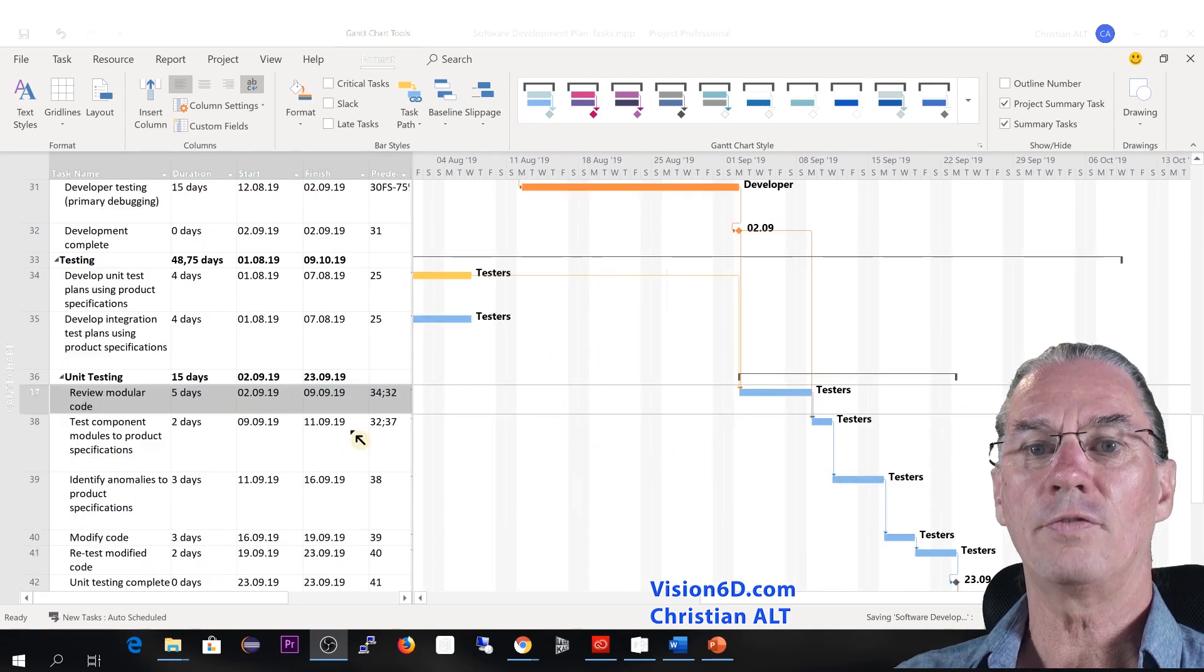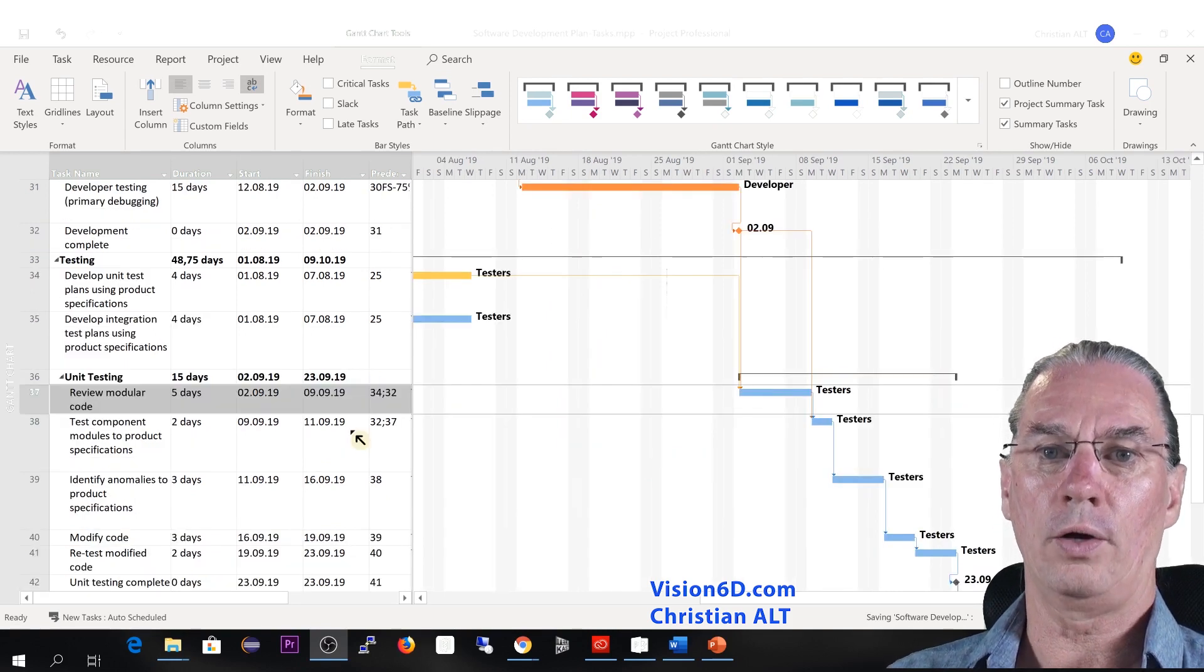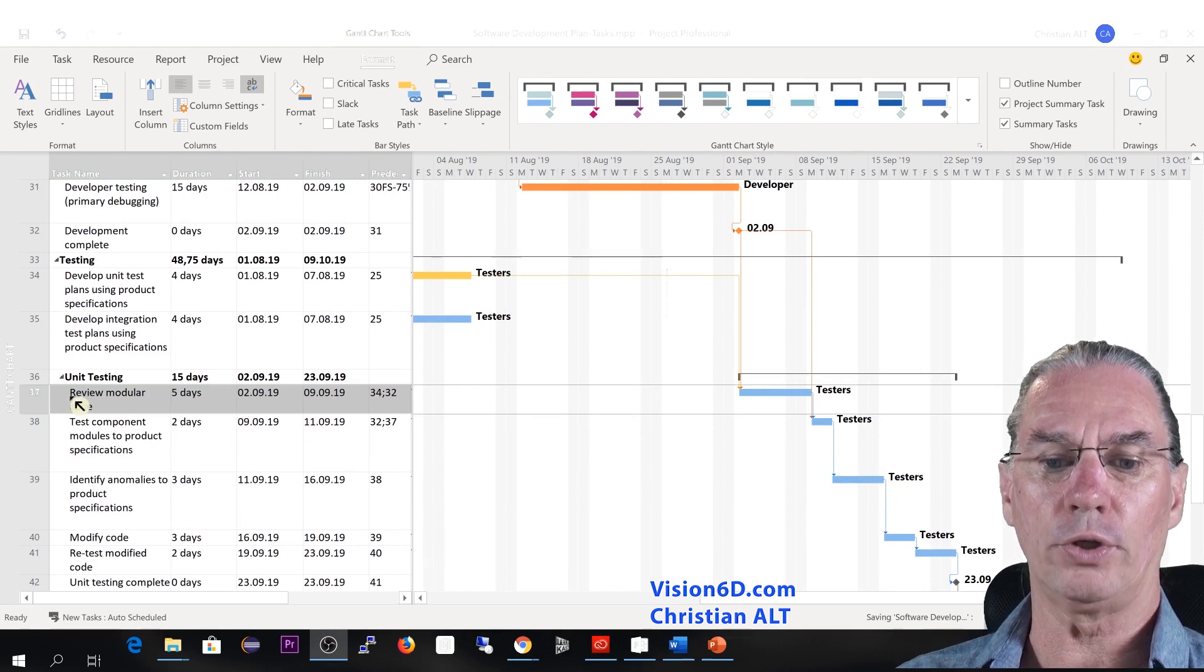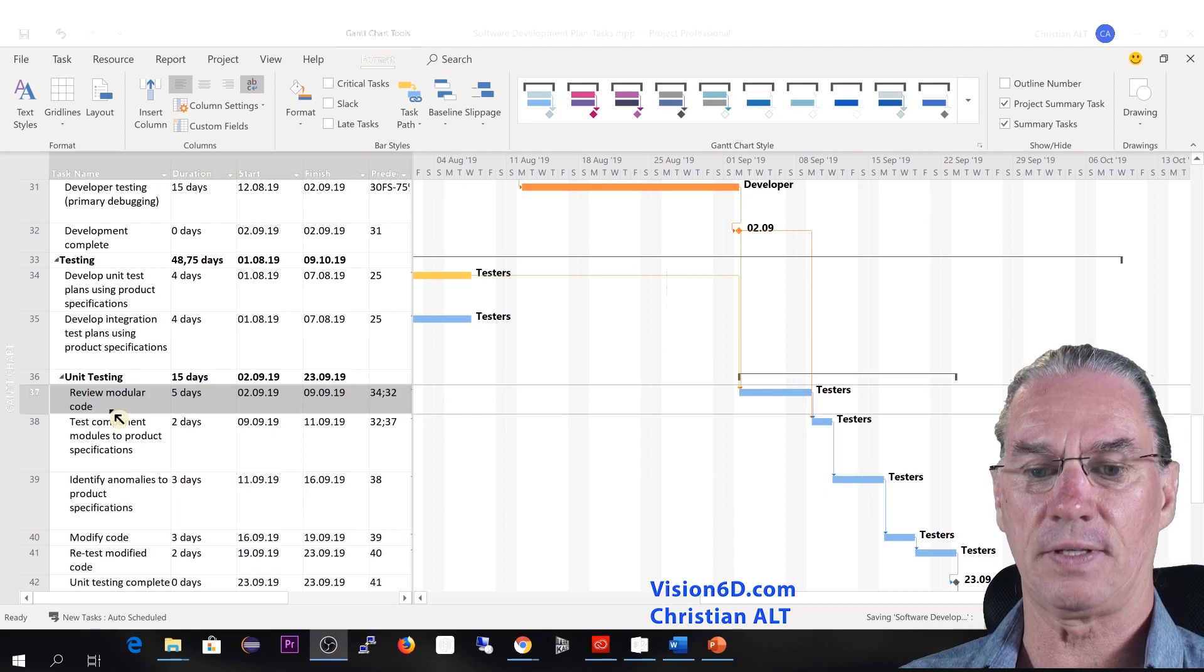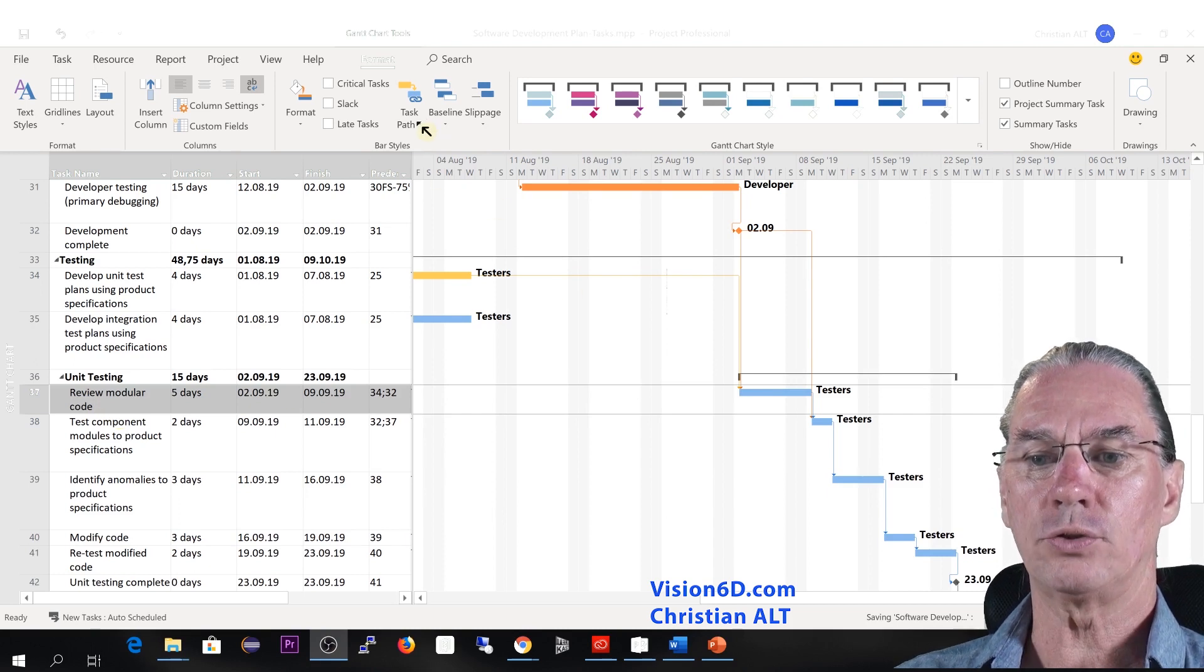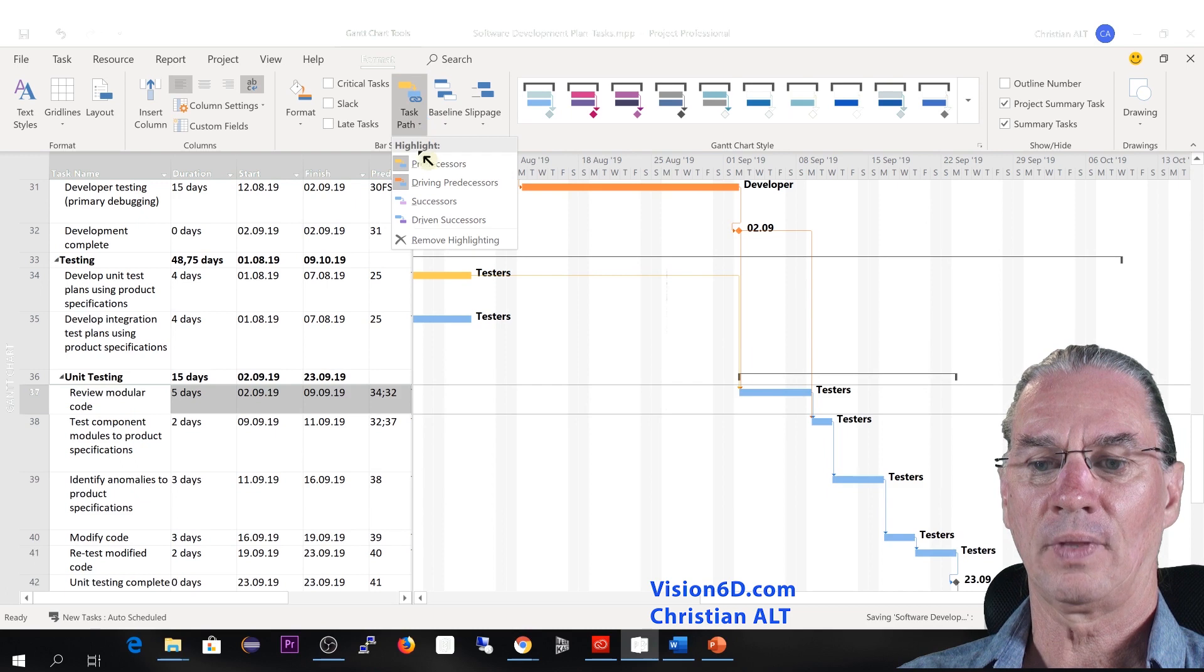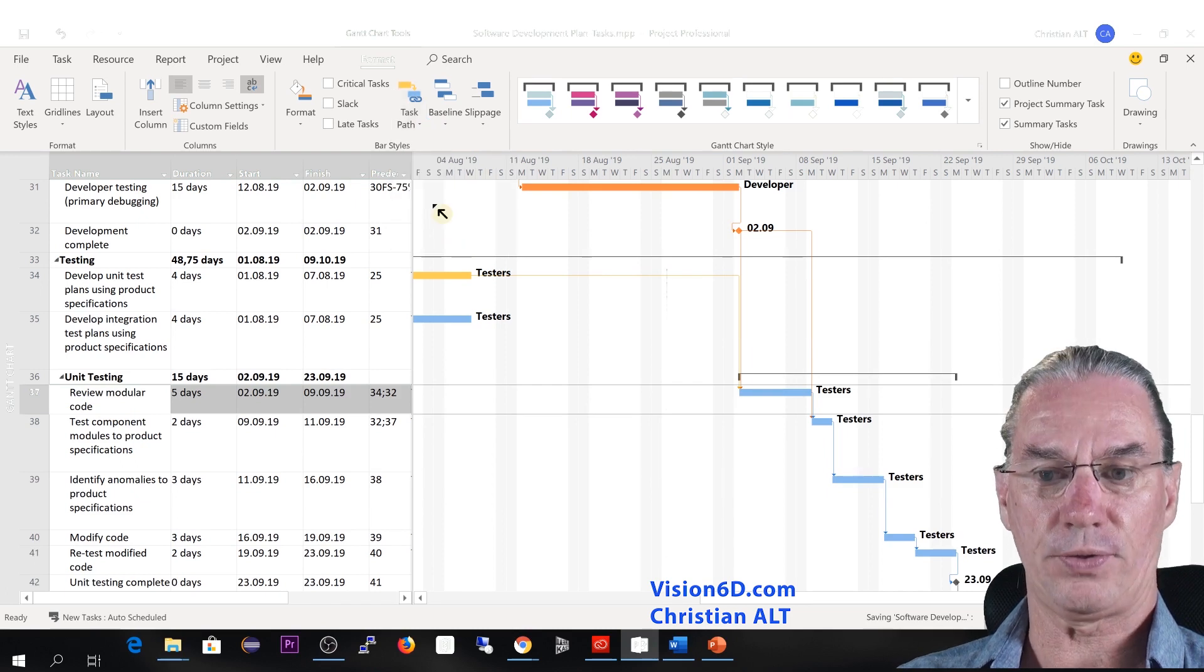If we want now to know which tasks are driven by our review of modular code task, we'll go into the task path and we select the successors.